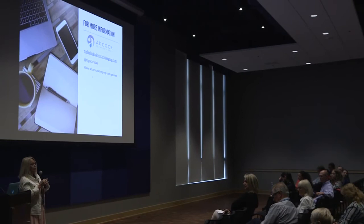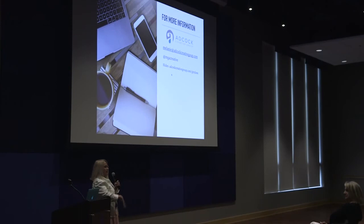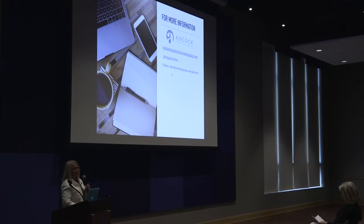What I do is I have a sample website Trello board set up with general information, design, development, pre-launch, launch, and post-launch columns. Then I create a board for each project and invite my clients in so they can see where we are and what we've done. If it's a small site, we'll do a card for each page, and they can see what's done and check off on it.